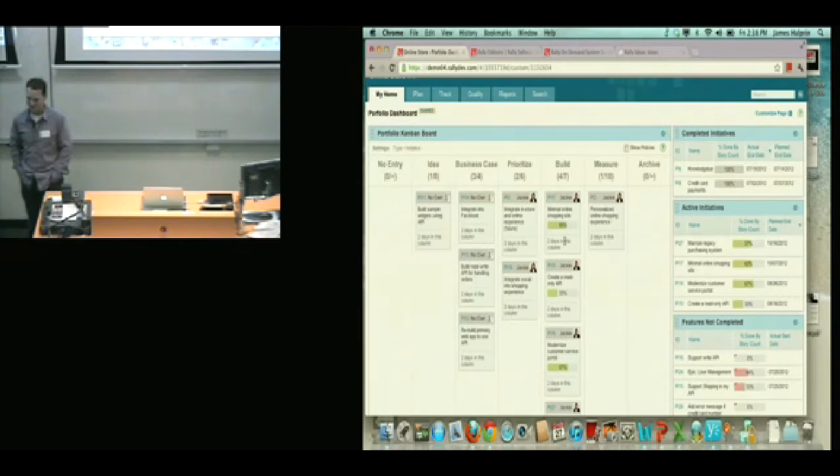They might be estimated. But do they contribute to the percentage complete, or can you sort of exclude and include a certain... Only if they've actually been attached to an iteration. Okay, so they're still in the backlog, they don't get included. That's right. So if they're unscheduled, then it's just going to sit in the backlog. But as soon as you pull it into an iteration or a release, then it's going to roll that up to the top.